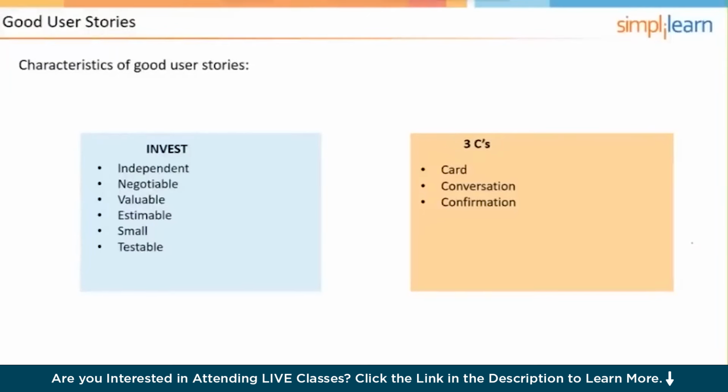That's where the team and the product owner discuss, and then eventually there will be acceptance tests included on the user story card in order to be used during the sprint review to assure that it's acceptable, that there's confirmation. Okay, so, let's add that to the memorization list. So, 3 C's.